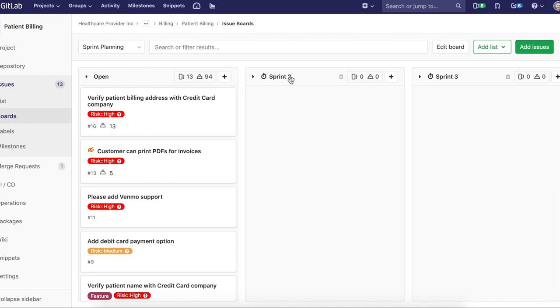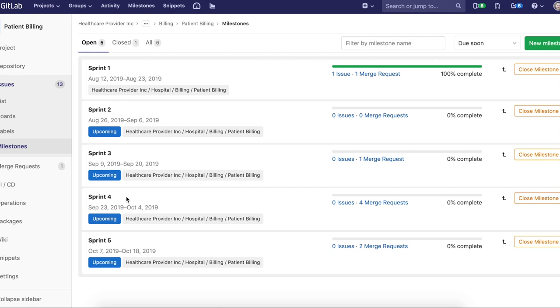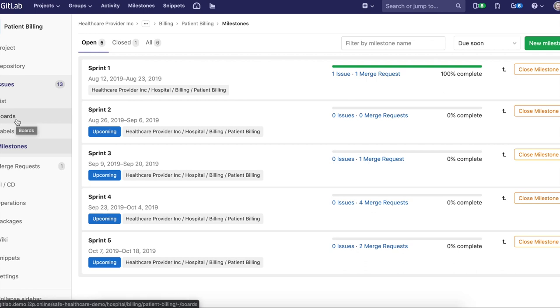Milestones in GitLab is a time box. I'll show you that right now. You can see over here in milestones I've defined sprint one through five. You could define releases if you wanted, like a 12.0, 12.1 if you're doing more of a Kanban approach. But milestones, this is where we do time boxing and we define our sprints.